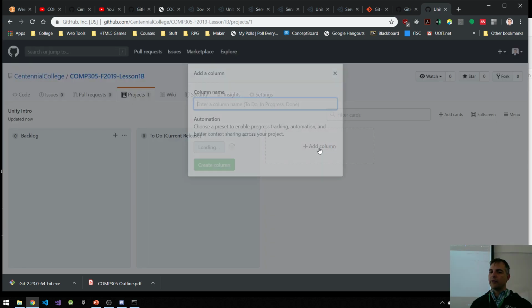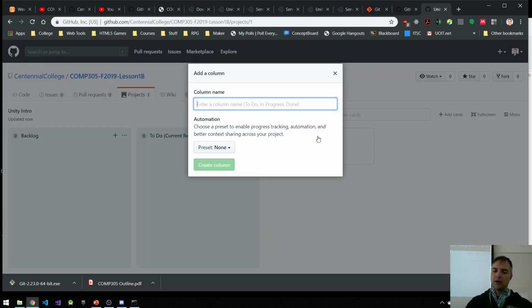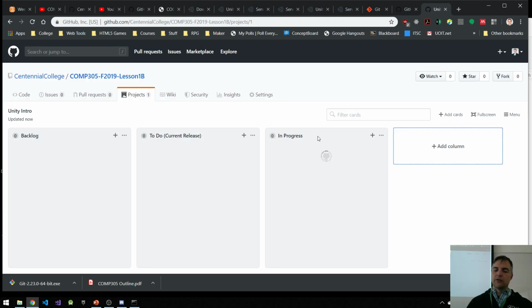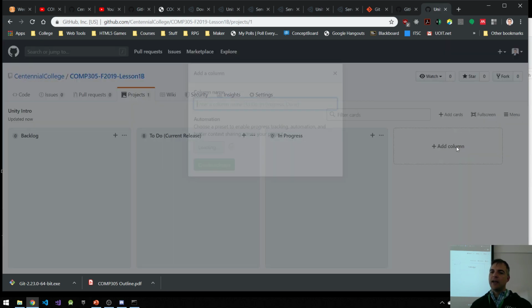Well, you need another column for that. And we're going to use a column called in progress. So the in progress column, you pull from the to do column to the in progress column. That basically signifies that you're working on that feature. All right? And then you have a testing column.